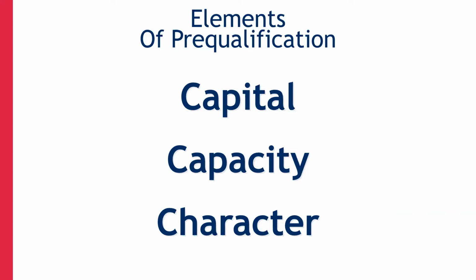The second of the 3 C's of surety is capacity. And that's essentially the capacity of management. Is this a one-man crew or one-woman business? Are there 2 partners? Is there a board of directors? Is there a director of risk management? What's the depth of the organization? How many project managers do we have? How many project estimators? How many crews? How much equipment? What is the capacity of the organization, at which point, if you were to exceed that, it would put an undue risk on the organization as a whole?